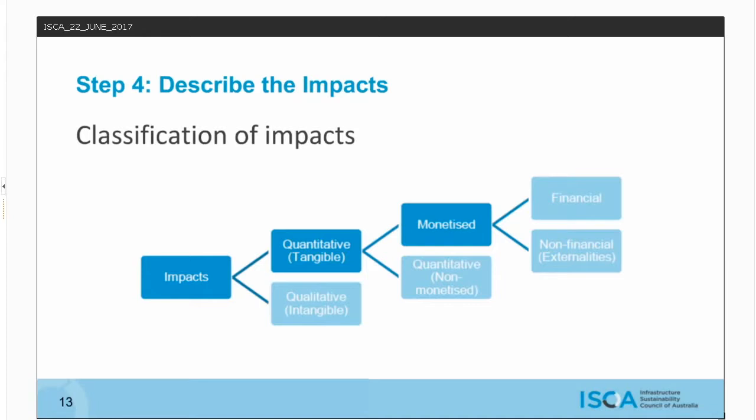They're used in reporting to regulators using metrics such as tonnes of CO2 equivalent emitted or kilowatt hours of energy consumed, internal project performance reporting to parent companies or benchmarking with other projects like environmental incident frequency rates, and internal decision making such as number of defects, number of complaints, actual versus planned construction time, or target and aspirational IS rating scores.